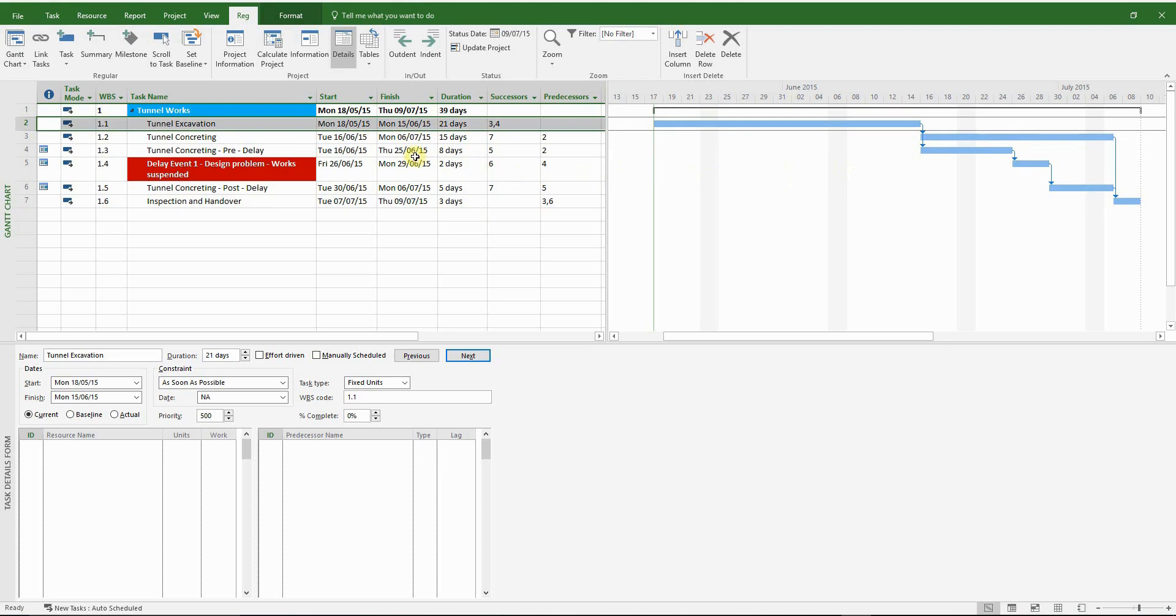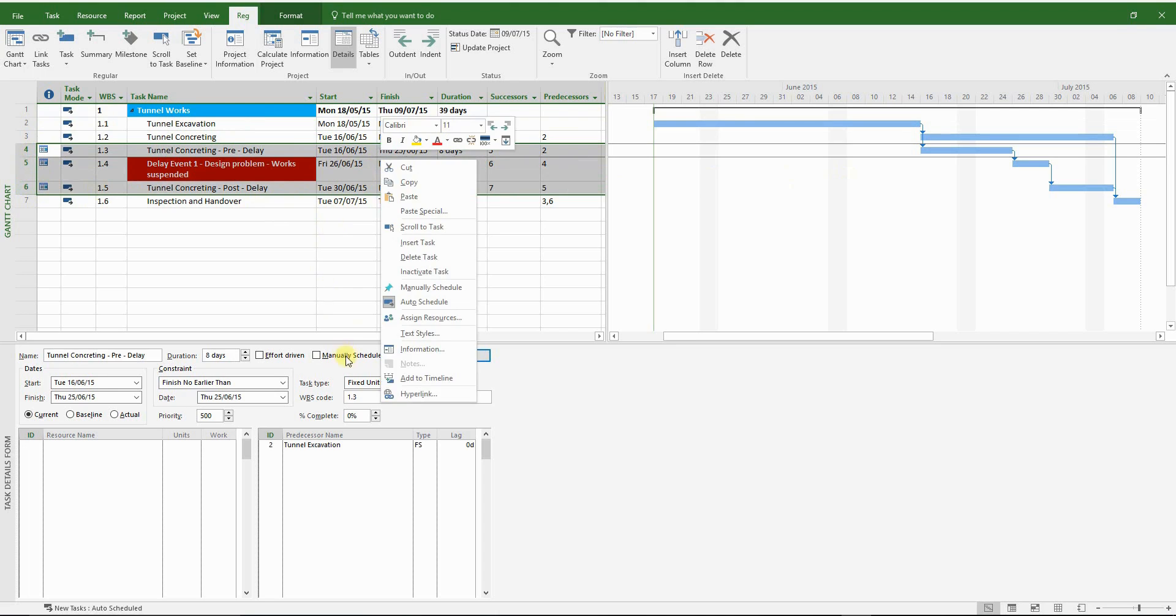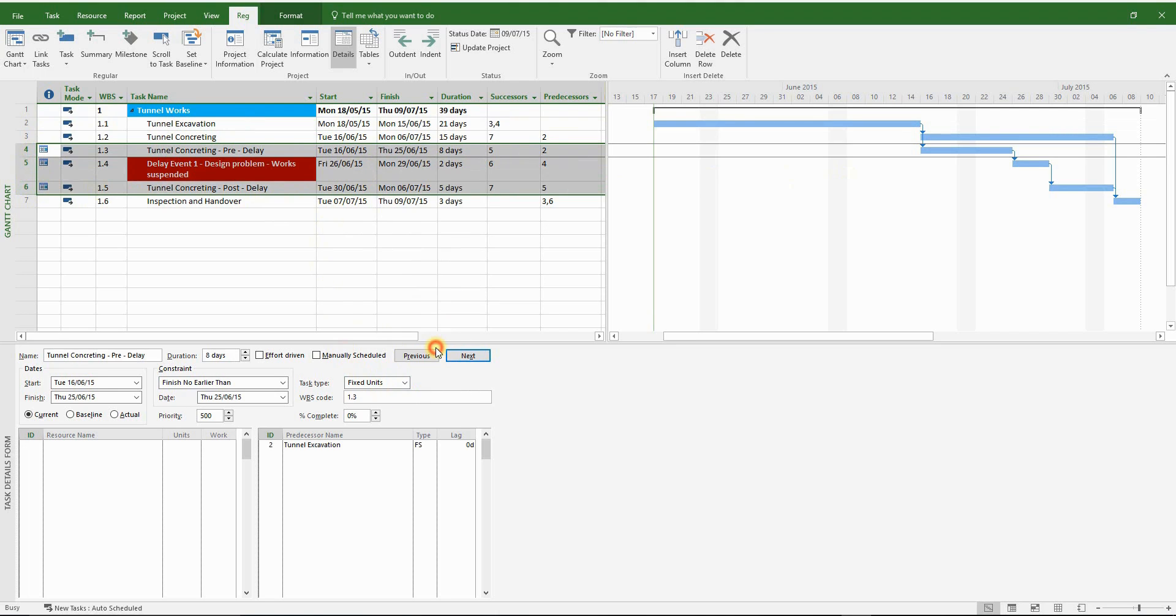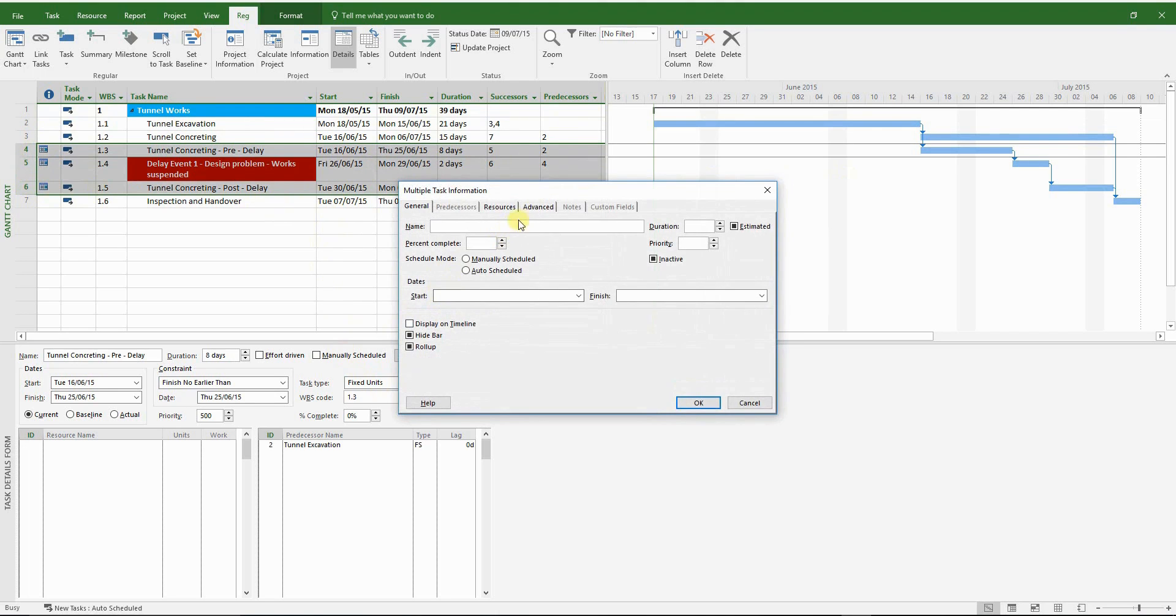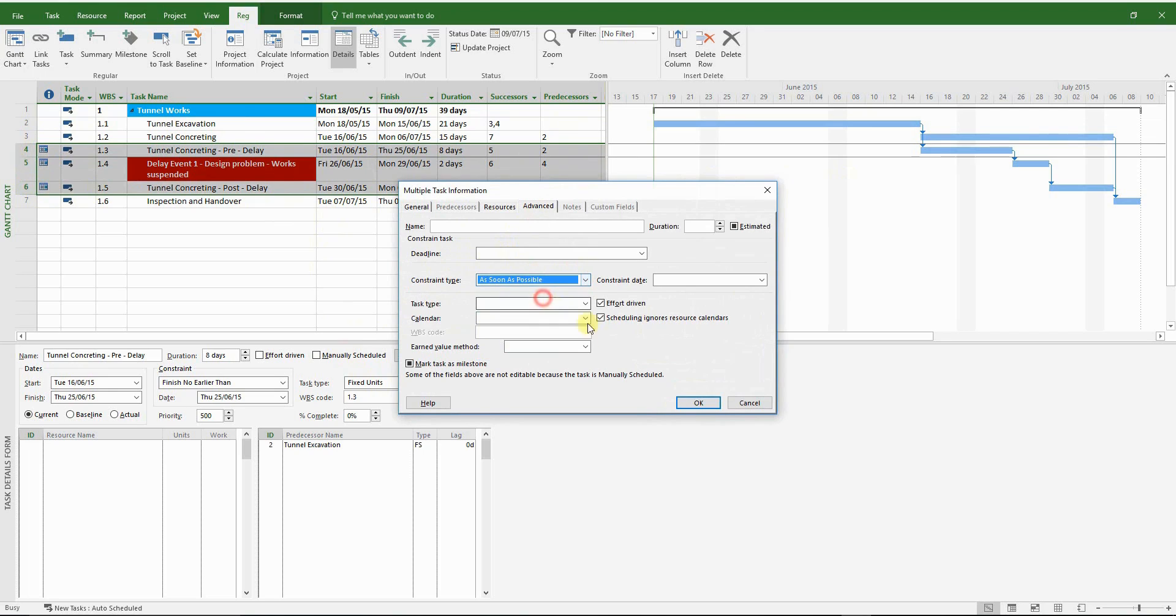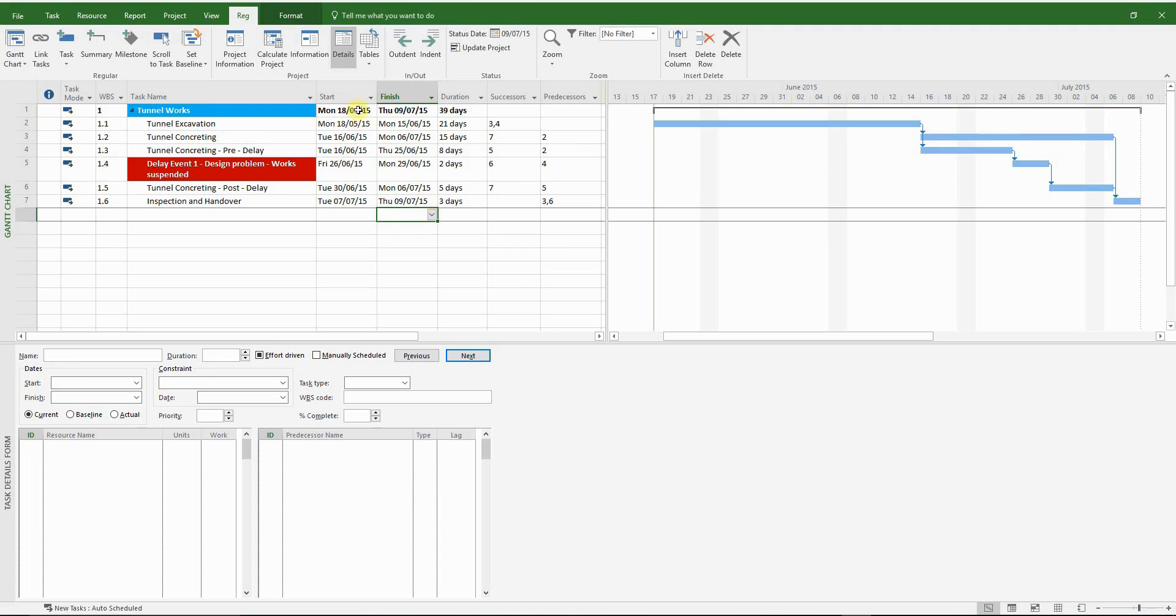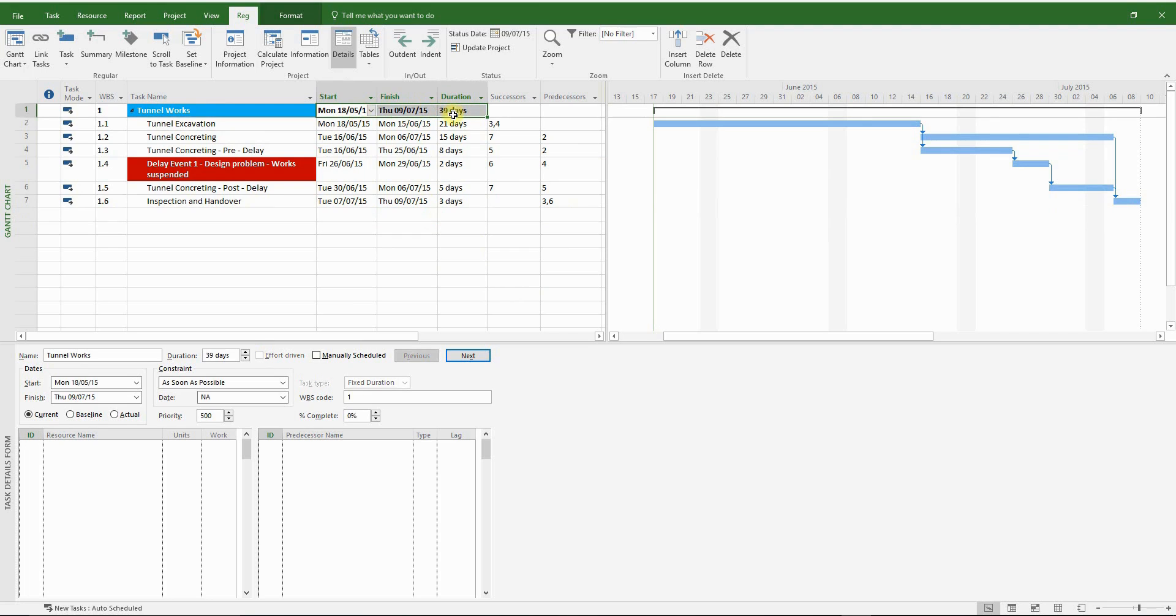And we need to insert one final link. A finish to start from the tunnel excavation to the tunnel concreting pre-delay. Now it's time to remove the constraints which were inserted by MS Project. Let's set it to the default as soon as possible. Everything looks good. The finish date has not changed.